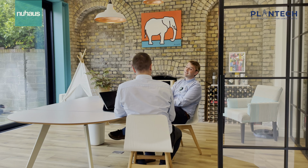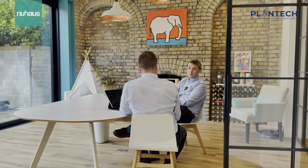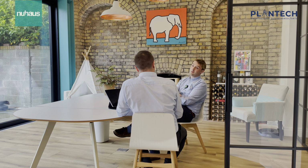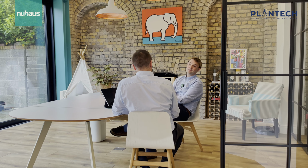And on that basis, we held back, and in fact had to demonstrate to the bank that we had held back, on the order of 17% of our original build. And actually our overspend came out at more like 15%, and so we were reassured that things had been handled as carefully as they could be, while at the same time addressing the works that needed to be done to ensure the house was warm, structurally safe, dry, and well positioned to work for us.